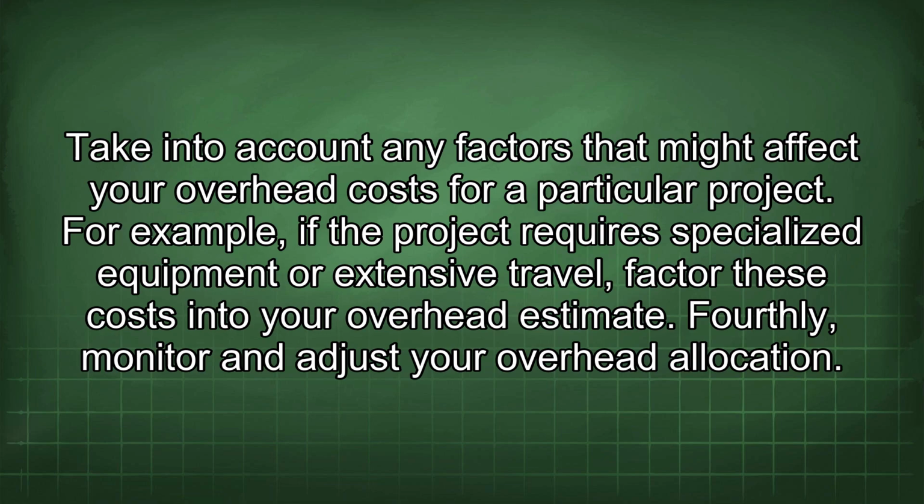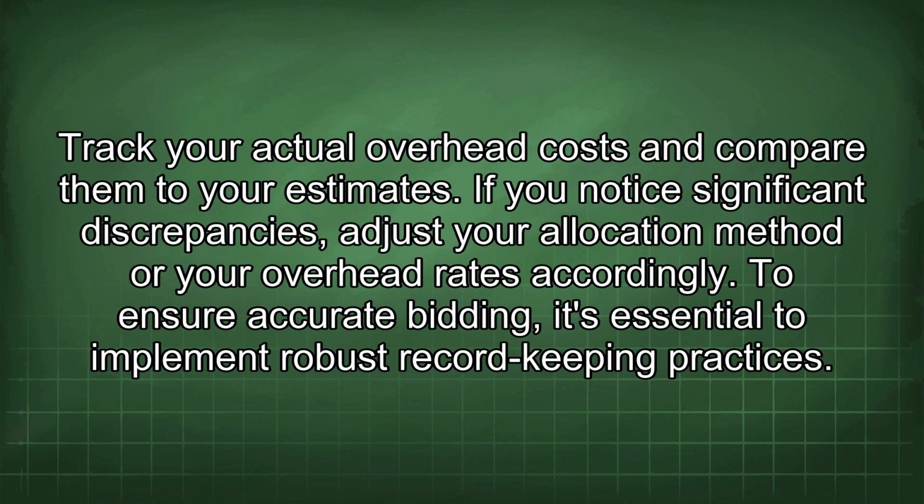Fourthly, monitor and adjust your overhead allocation. Track your actual overhead costs and compare them to your estimates. If you notice significant discrepancies, adjust your allocation method or your overhead rates accordingly.